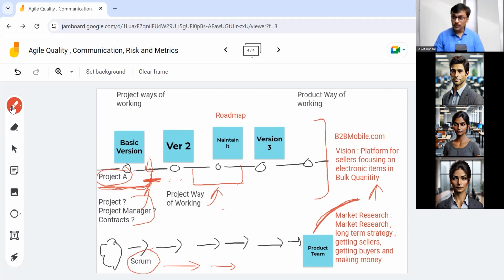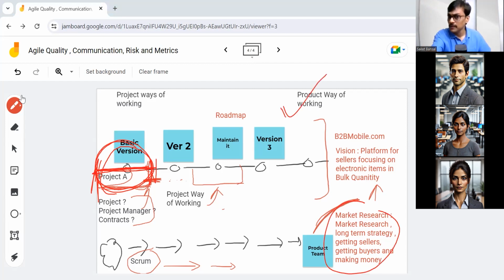Yeah, so you probably need to create a project plan or a high-level project plan. It is not a roadmap. You will say that you need to give a portion of your roadmap which comes under your project boundary. You need to give a milestone till here. So the project management team will focus on this portion only, but the product manager, this group, may maintain a high-level roadmap also. Got it.